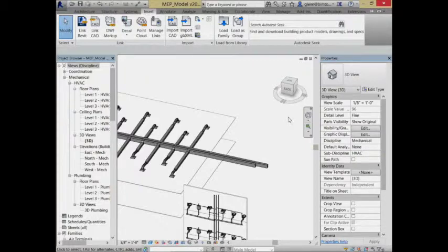It's interesting, Navisworks doesn't let you change the underlying models. The models that were actually used to create the design, we can look at, we can see, we coordinate, but we can't change. When it comes time to change, we have to go back to the original design model, and that's by design. Because I don't want to give you my structural model and have you have the ability to change it on me. I'd rather you tell me I need to make a change so that I can control that and give it back to you.